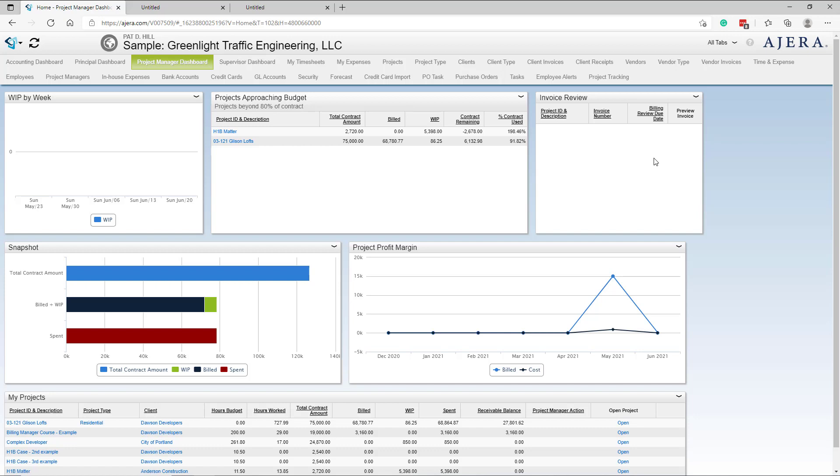Print it and annotate the PDF or the paper copy. Also keep in mind that the notes on the invoice screen, the billing review stages, those notes sometimes disappear. If the invoice has not billed this round, don't expect that those notes are going to be there for next month. If you have to keep notes, keep them somewhere else. Thanks, bye.